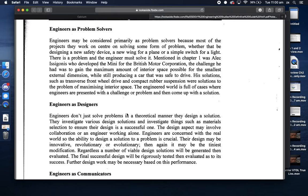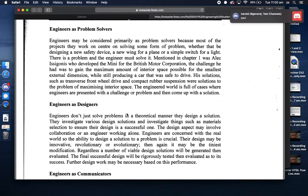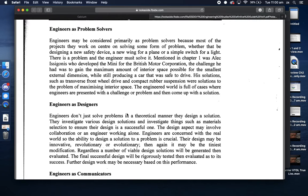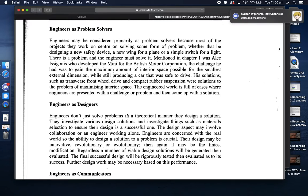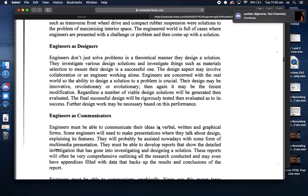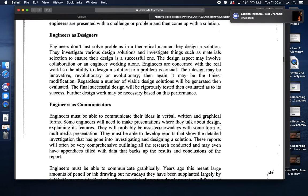On a daily basis I used to get a phone call from the site engineer, a guy called Paul. Every morning the phone would ring and he'd tell me what the problem was that day. He would talk about what he thought was an acceptable solution, I would check the design and say whether it would work. Then I would hand draw the drawings, send them to drafters who would certify those drawings so they could start building, and then drafters would do a formal drawing signed by the head of the project.